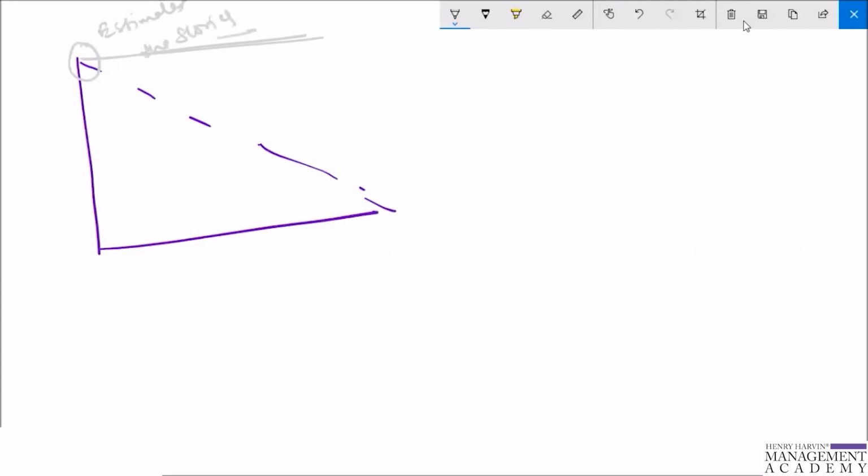To fix this situation, the team should immediately arrange a planning meeting, estimate the user stories, include them in the sprint according to the velocity, and start the sprint. So this requires immediate action. And when you have started working with the team, like with the previous graph in which the team is not actually burning anything, the Scrum Master needs to pitch in here, and immediately ask the team to get the work done on the chart.